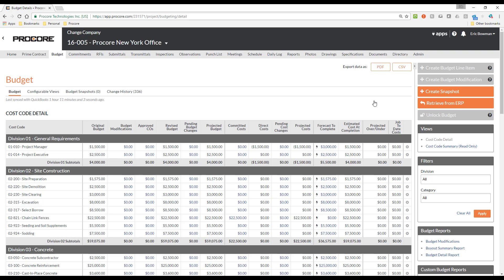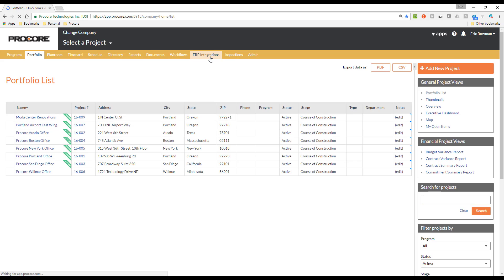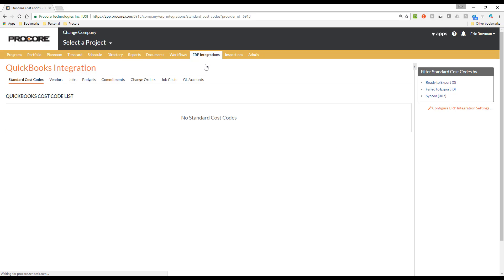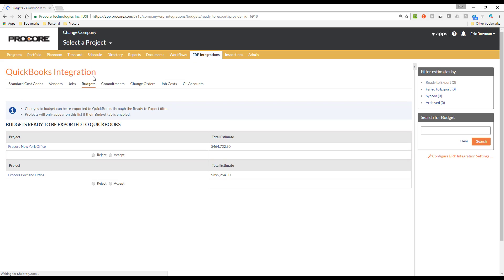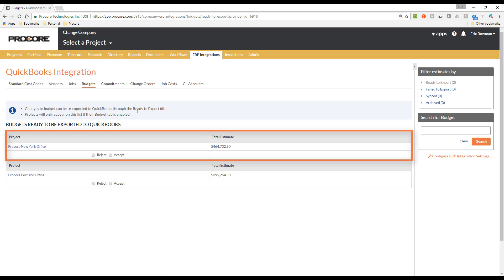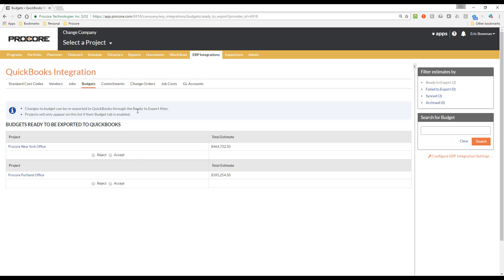The Send to ERP button is your way to get the budget to the accounting approver, who then reviews it and decides if they want to accept it and go forward with the export to QuickBooks, or reject it back to you to make changes before it is exported. The accounting approver will do this at the company level on the ERP Integrations tab. In this case, it is a budget that is waiting to be exported, so we will go to the Budget sub-tab. Here you can see the budget awaiting review on the Ready to Export filter. We have two options: to reject it or to accept it and export the budget to QuickBooks.